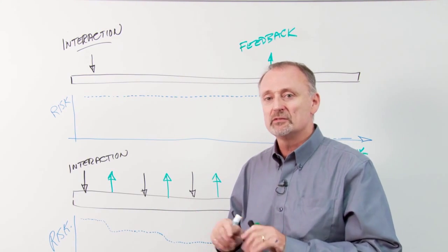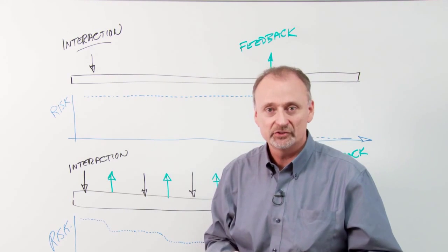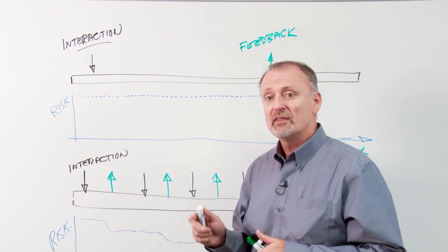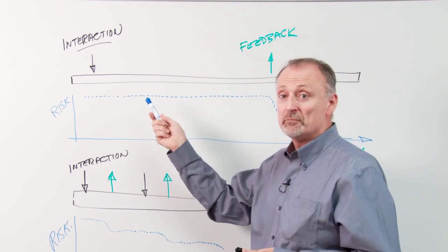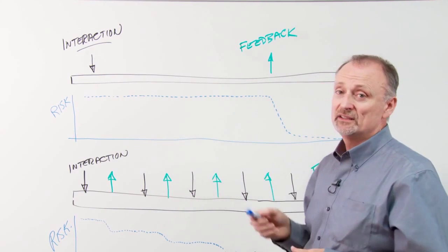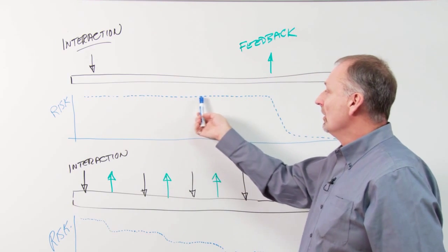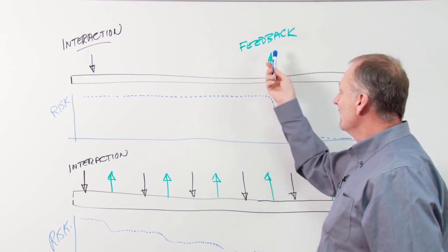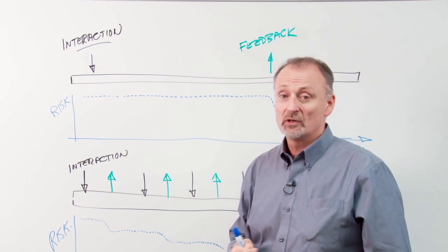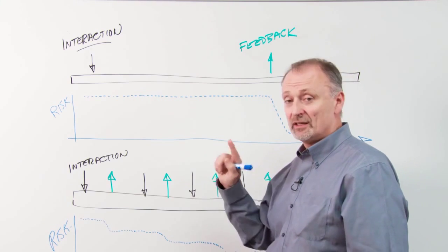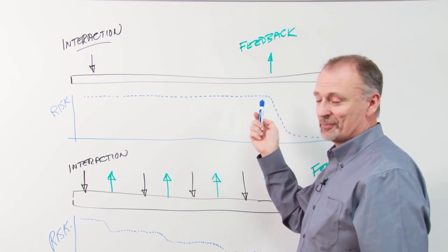Usually that quality of feedback you don't get early in the process by looking at textual, legal style requirements. You get that when someone actually sees a functioning version of the application. And in Waterfall, that moment does not happen until quite late in the life cycle. As a result, your risk curve stays high all the way through until they see that. And it's at that point that we get that feedback, we make the adjustments that we're able to make at that point in time, considering that a lot of the budget and time has already been exhausted, which is part of the problem, of course.